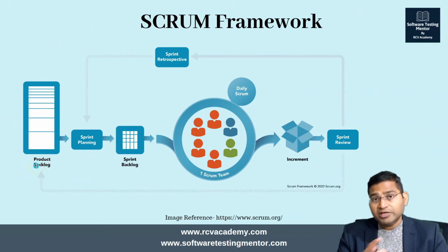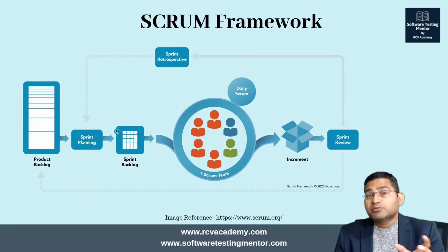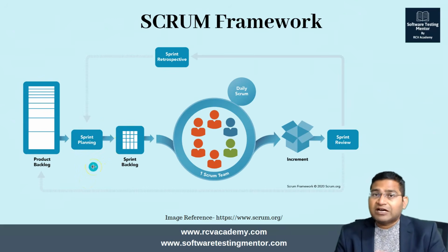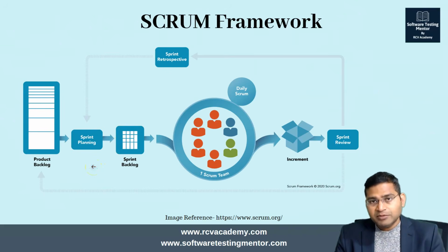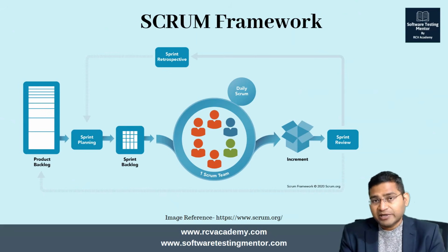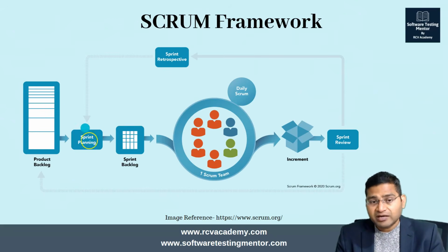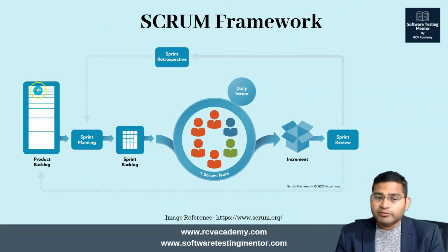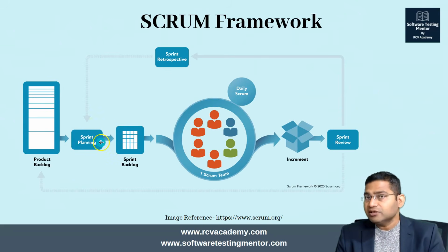So a person will be a product owner. Okay, so those items are being pulled, they are being discussed, and that forms the sprint backlog. So say, for example, 5 people are working within the team, whatever work they can do in 2 weeks is their capacity. As per their capacity, they'll pick the number of work items from the product backlog, and that will be the sprint backlog.